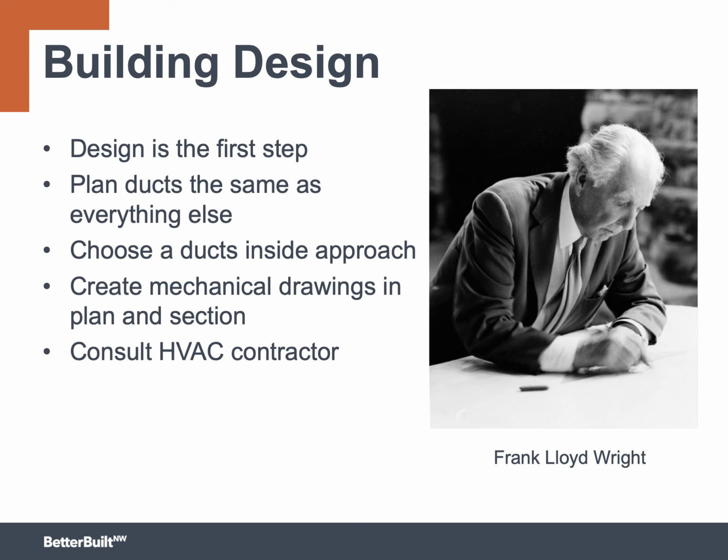And I understand why that happens because people don't want to raise any red flags with plan review, but with the Ducts Inside project, it will be very beneficial to have all of the information on the plans. For one thing, the plans are a contractual document that really ties all of the different trades together so that the complete plans have the final say on what will be in the building and how it will be done.